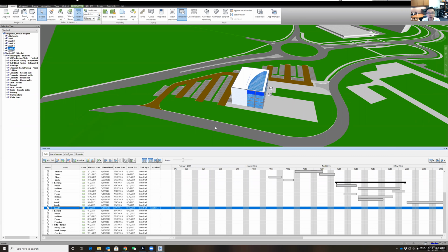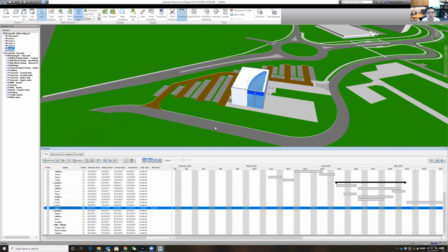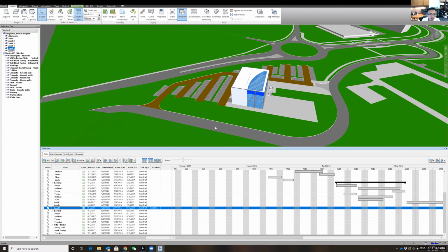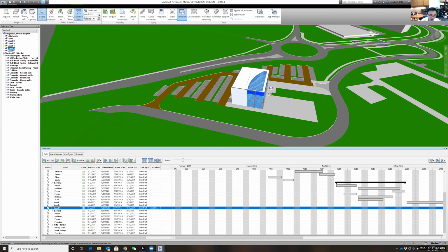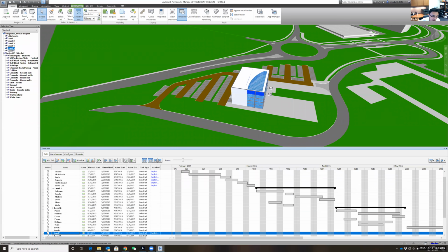If you want your simulation to look cooler with a lot of detailed animations, showing the animation for each column, each door, each window, you have to create more activities here and keep unfolding the selection tree and link each of the activities. But you can also show the animation for the entire floor, if that is your purpose. Like I mentioned, you can just do this.